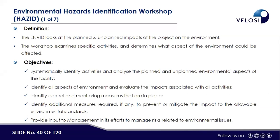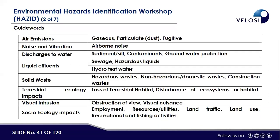ENVID also identifies all aspects of the environment and evaluates the associated impacts — again assessing them as low, medium, or high. We identify the control and monitoring measures in place, and if additional control measures are needed, we add them to prevent or mitigate impacts to the allowable environmental standard. It also provides input to management to manage risk related to environmental issues. Guide words used cover all components of the environment — for example, air emissions, including gases, particulate matter, and fugitive emissions.